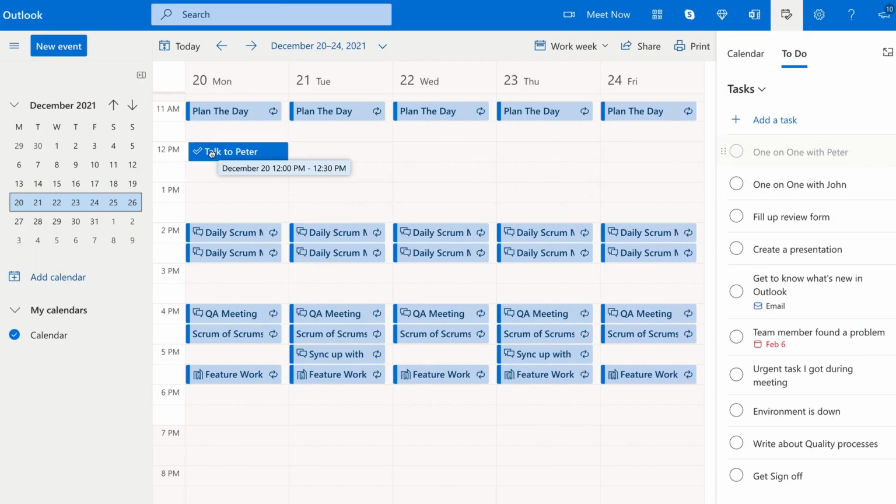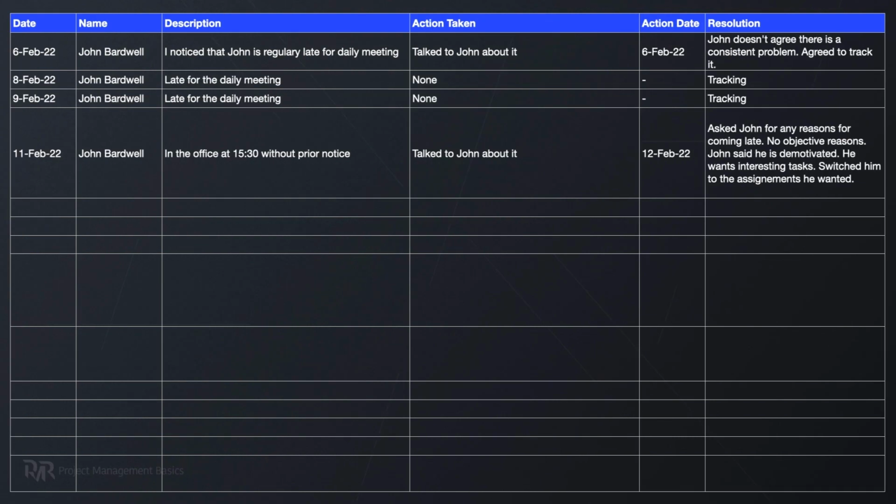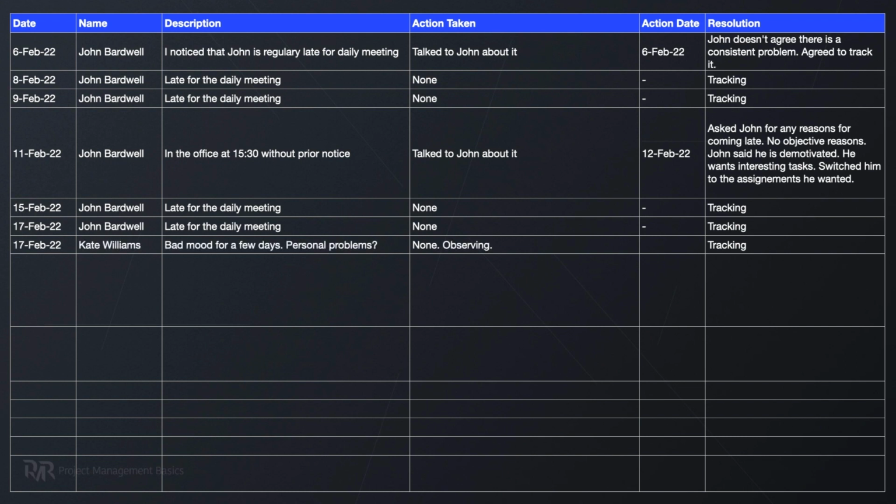So, start planning out a 30 minutes call with your key team members tomorrow. If you have a big team, you need to delegate these sessions to your group leaders. But before you do so, give them a brief refresher on leadership and communication skills. Then, if they identify a conflict, you can step up and help them to resolve it. And you must capture all these conflicts into an issue log. It's a simple spreadsheet where you can see all conflicts in a chronological order.